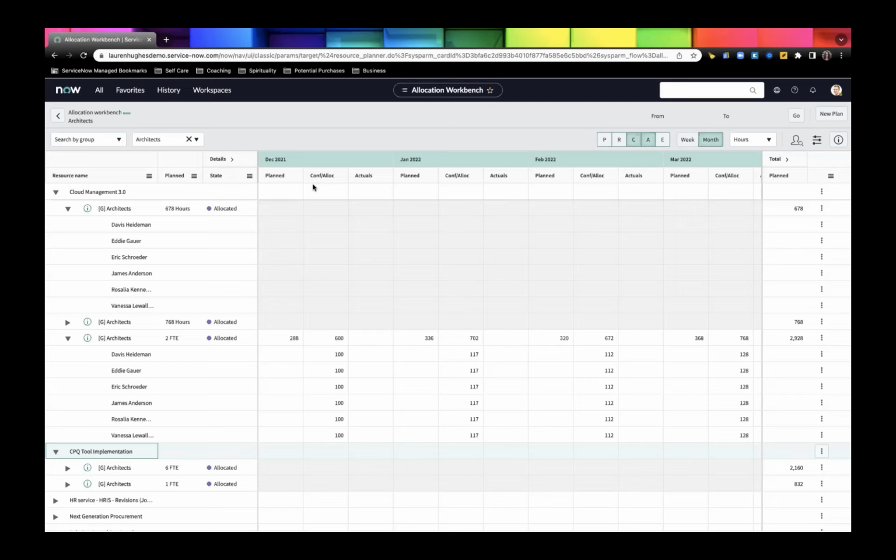Okay. But it's going to keep the original rate cost unless you recalculate it that it was originally done on, right, Luis? Mm-hmm. Correct, yes. So there's not any automatic back changing once you change a rate and it's already been a